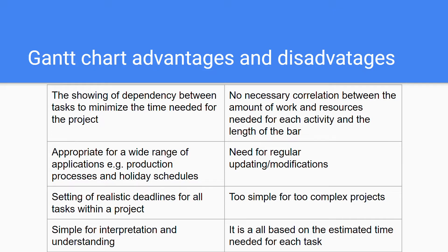A negative or a disadvantage would be that there is no necessary correlation between the amount of work and resources needed for each activity and the length of the bar. So this can be very misleading if you think about it as the bigger the bar is, the more you'll think that there's also way more work to do. But this has actually nothing to do with work or resources that you need for this task.